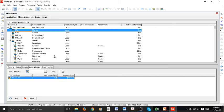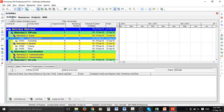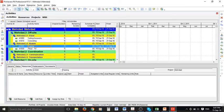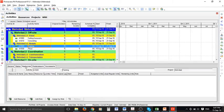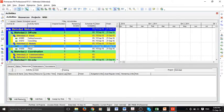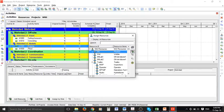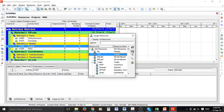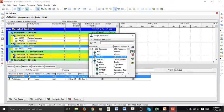The next step is to assign these resources. You can go to activities tab and select one of the activities you want and then assign resources. We do this by going to resource tab in the detailed part of the screen and add resource is down the bottom. For example for this framing activity because it is in the module construction in the factory we want to use welder as the primary resource and also we have a laborer for this purpose as well.